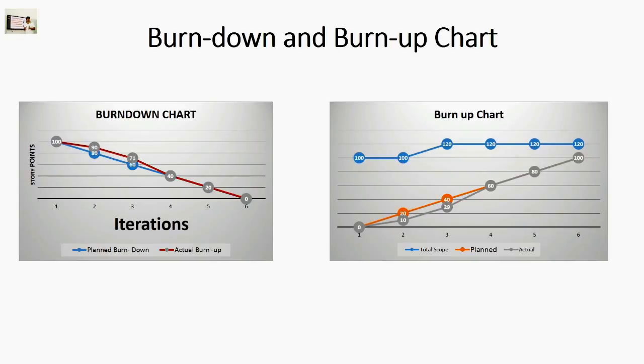One major drawback of the burn down chart is that it doesn't show clearly the effect of scope change on a project. If a customer adds work during the project, the scope change would appear as negative progress by the development team on a burn down chart. In comparison to this, scope changes are immediately evident on burn up charts. When new work is added, the total work line which is usually flat and steady will clearly show the increase in the scope and total work as shown in the picture.